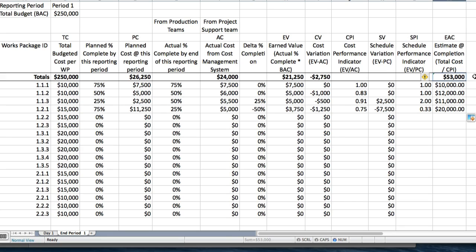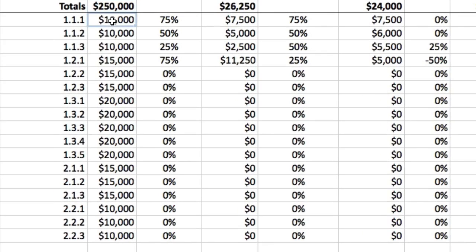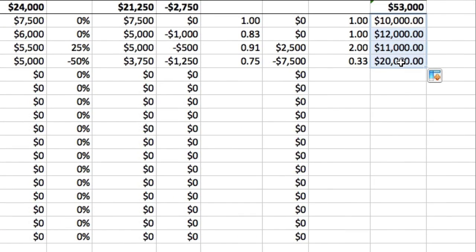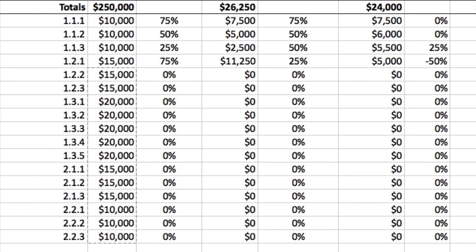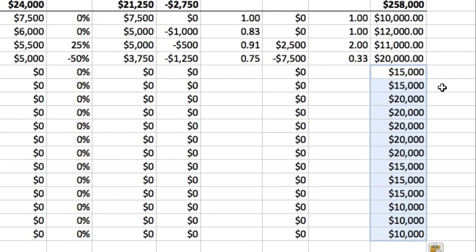Now let's consider the estimate at completion for the whole project, currently shown in cell M6 at $53,000 — well below the budget at completion of $250,000 in cell B6. Something is definitely wrong here. It's because we have added up the budgeted cost for all work packages in column B, but only added up the work packages currently in progress in column M. For work packages not yet scheduled to start, we can assume the estimate at completion will equal the budget at completion, so we can copy-paste the budget from column B to column M for all work packages not yet started.